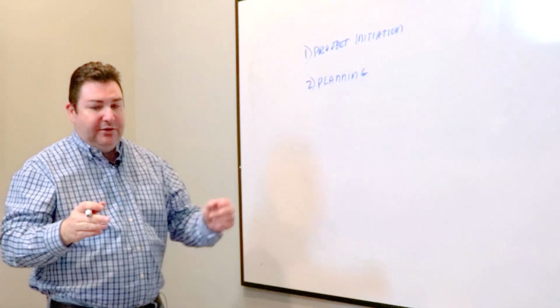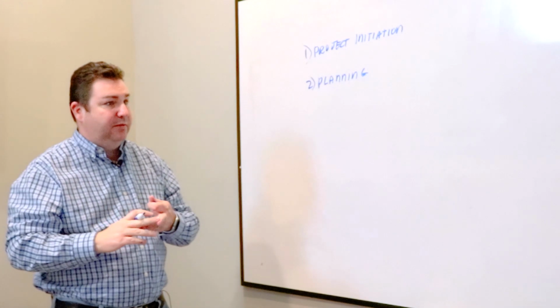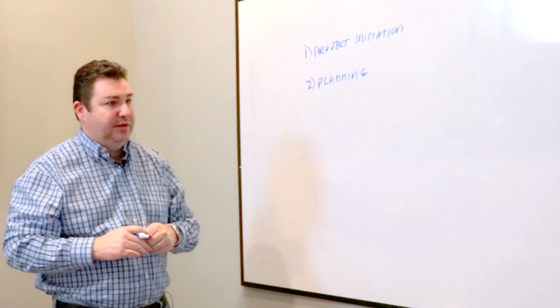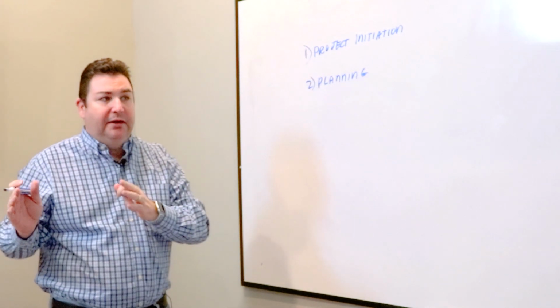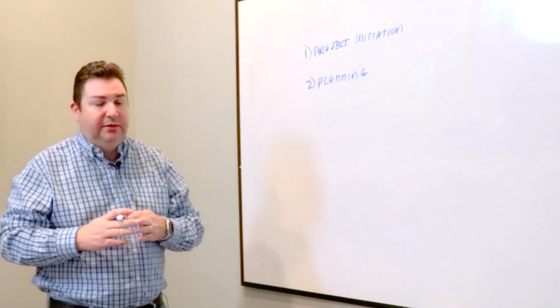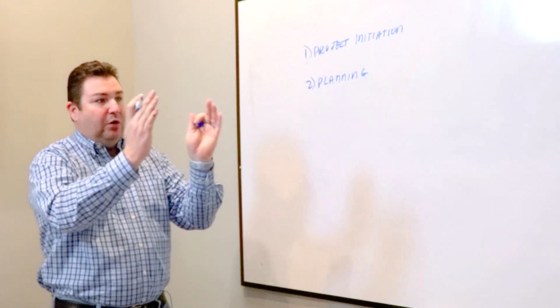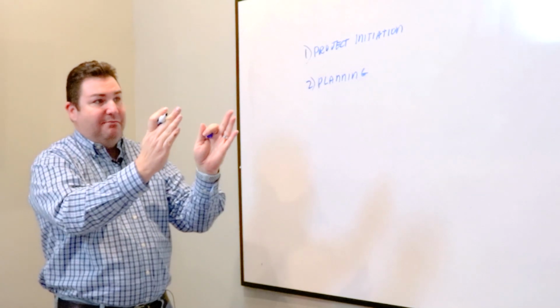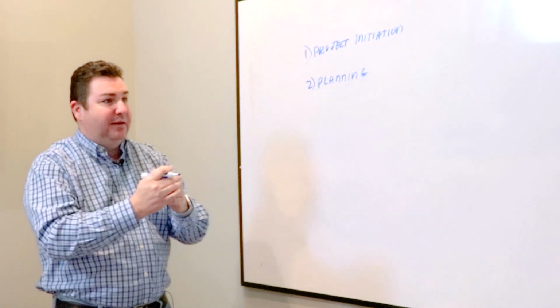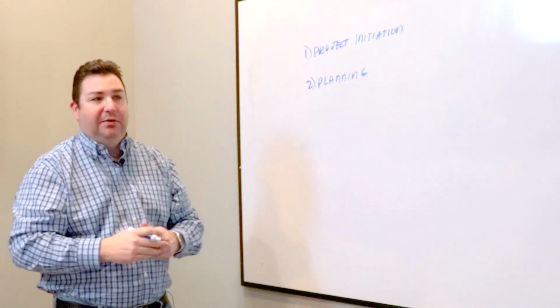So the next step really starts to dig into the details of planning the project. In that phase, you're going to do things like refine the scope that you defined under the original project initiation, because you're learning more as you go, right? You're going to go through your team selection. So you're going to actually replace a role that may say, project team member with somebody's name, right? And say, now we've got to the point where we understand who's going to be involved.